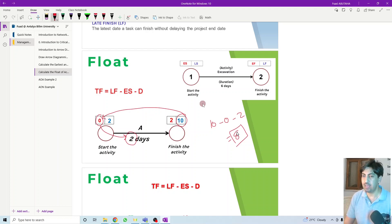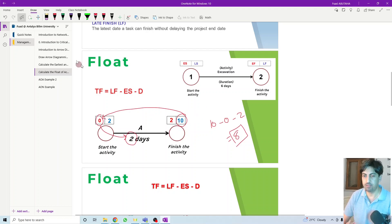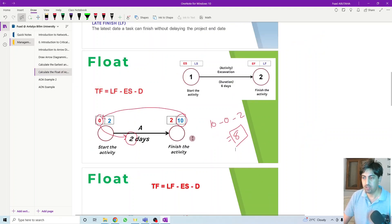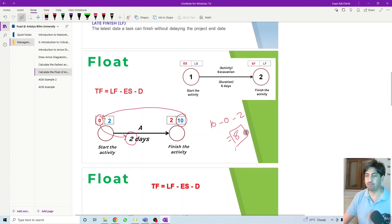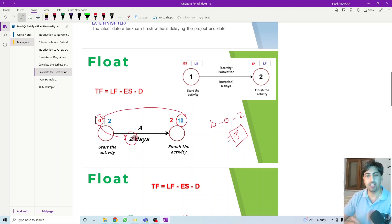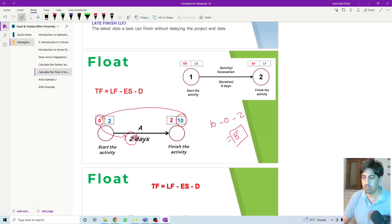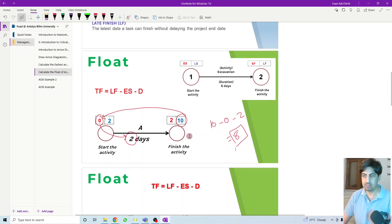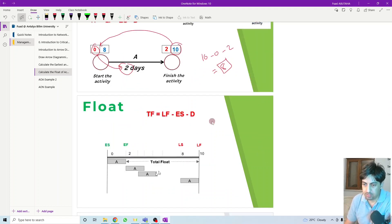Activity A can be delayed up to 8 days without affecting the total project duration. If we delay 5, 6, or 7 days, the project can still finish at day 20. But any single day beyond the maximum float — beyond 8 days — will start to affect the total project duration. Activity A needs two days but has up to 8 extra days of flexibility.